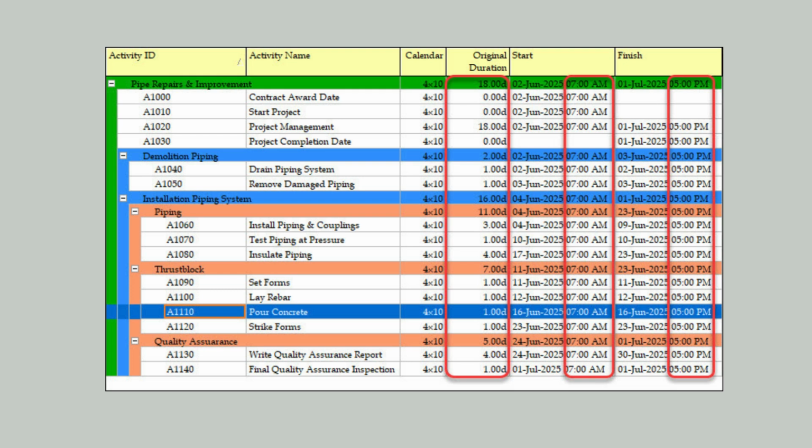And they do. Setting weekly hours is a good start, but you must also specify the hours per time period to match, or your tasks and deliverable durations in the activity table will be off. If your schedule workweek is composed of 10-hour days, the time period hours per day must be 10 hours, so each 10-hour time span equates to 1 day and not 1.25 days.